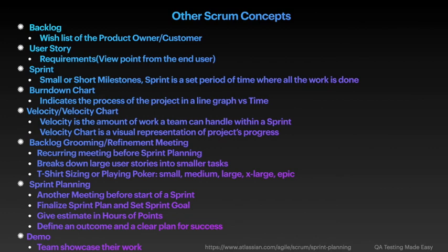We follow 2 week sprint. Sprint is nothing but a time period. The team has 2 weeks. Stories picked up by the team should be completed by that time. For any reason, if they cannot finish all the tickets or user stories, those remaining tickets can roll into the next sprint. I am used to saying grooming meetings.